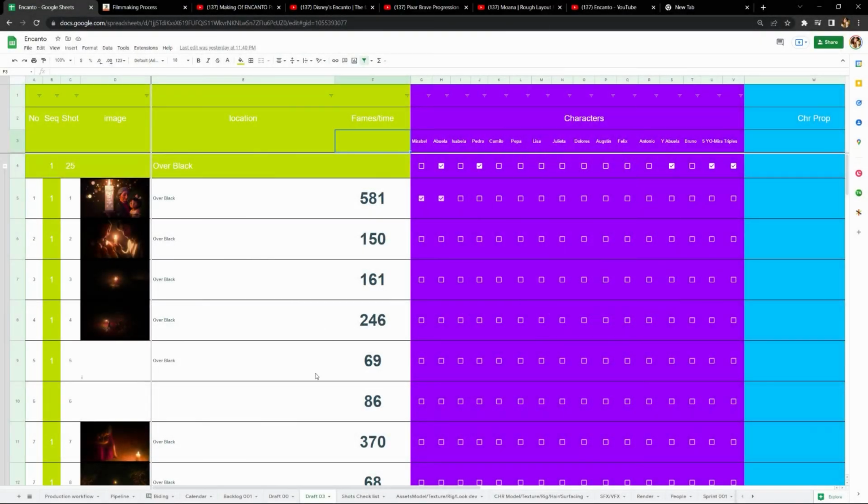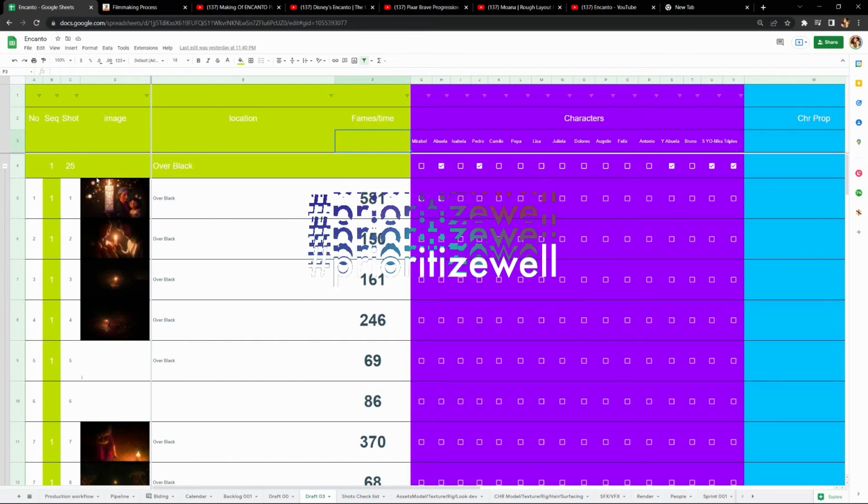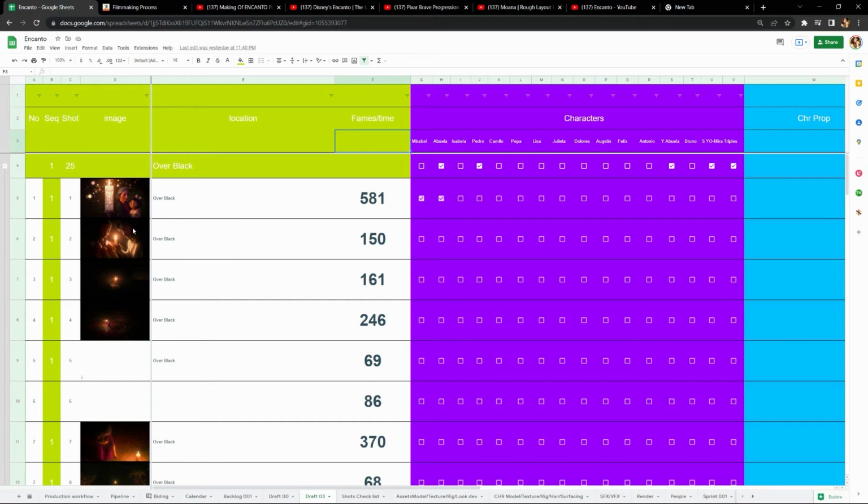For me, the last draft would be made out of the previous one. That could be something like this. The important information added to this table is timing and lighting. It helps the team prioritize making assets and sequences. You will know how to start production, which sequence is the best one to start with, and then we can give every sequence and shot a level, priority and importance.